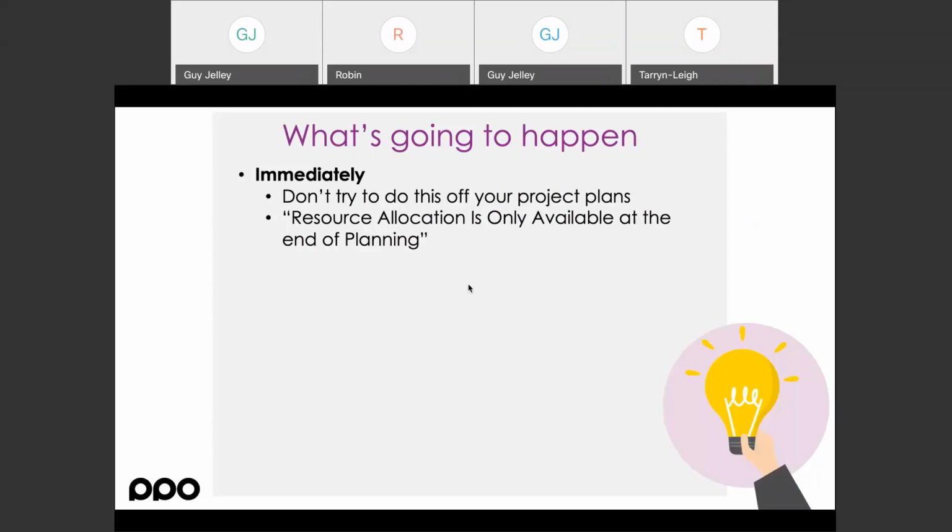With the rise of agile and these type of things as well, you're not going to have project plans and all of these things for some of the projects. So trying to drive that out of a project plan is work. It's very sad because when we actually built PPO many years ago, we had this utopia that once the project plans were done and you imported it into PPO, you created this beautiful resource allocation model, and we actually had to roll back all that functionality because after 7 or 8 years of having it, no clients were able to actually do that. So we decoupled the resource allocation from the schedule, and while the two should talk to each other and should resemble each other, we found having different data sets actually gives us the ability to ensure that our schedule, milestone, and planning is accurate, and that our resource allocation is accurate.